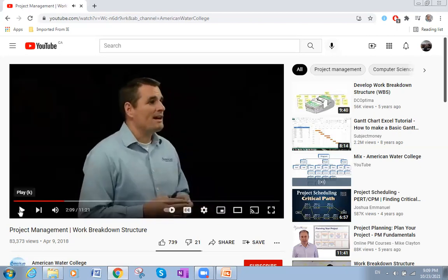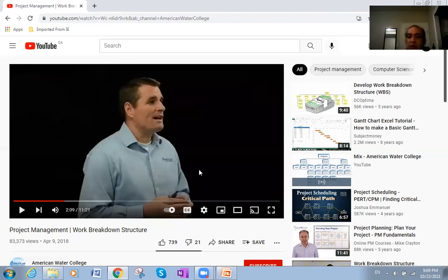The main idea: here in this stage, the breakdown doesn't care about which stage or which phase will come first, or the order of each stage. It cares about what the work related to this phase is. As an example, to get the vacuum, he must take it out of the closet and plug it into the wall. But in the work breakdown phase, we don't care too much about which activity comes first and which comes second. That is the concern of the schedule, which comes next after breaking down the work.